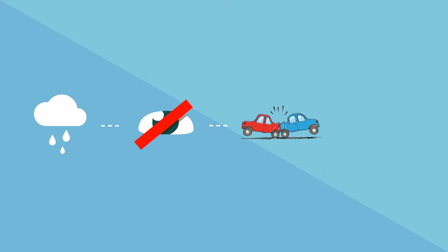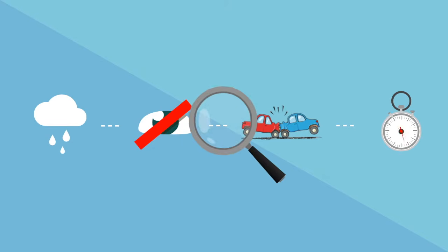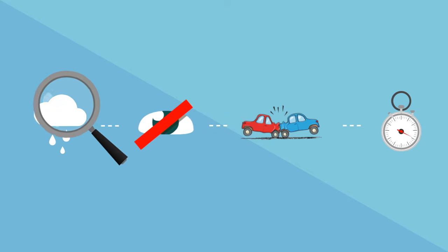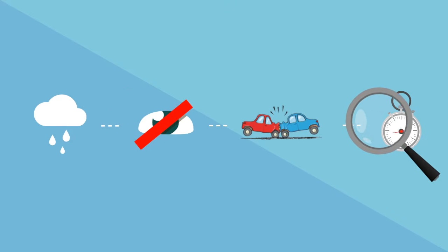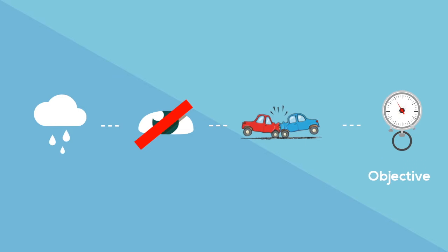Heavy rain causes a decrease in road visibility, and that in turn causes an accident. That accident will cause Charlie to be late for work. Let's investigate this event tree. The difficult part is to pinpoint which event we identify as the risk. The last event, being late for work, is the objective. Well, it's the opposite of what you want to achieve, but it's directly linked.